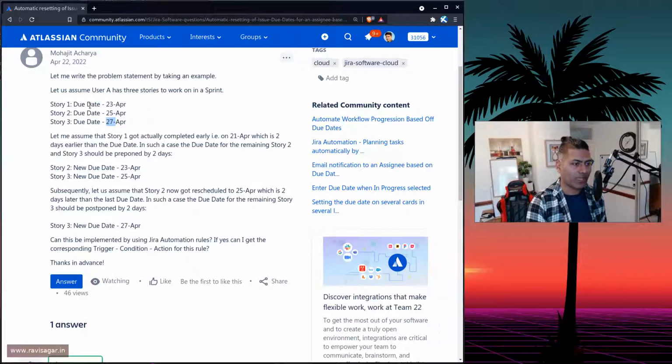Now, talking about sprints and the way people want to use sprints, when you have a sprint, you're basically defining what you want to do in that particular sprint. So your objective is to deliver the planned stories. I'm talking about agile. For example, if you start the work in the beginning, we have the sprint 0 or 1, whatever you want to call it, and in the beginning we want to deliver, let us say, 5 stories, and their total estimate is, let us say, 20, 25 or 30 story points, and that is the objective. Whether you finish those stories before, or maybe you're not able to finish those stories, then of course things will reflect.